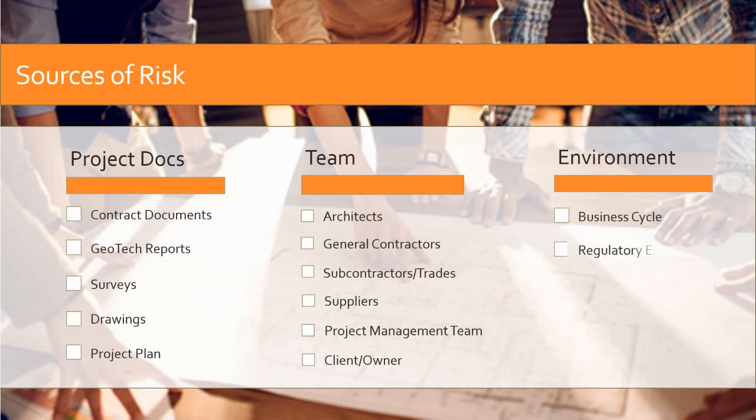What type of regulatory environment are we in? Is there a government change in the offing, or are these regulations likely to change soon? Also consider site conditions, the conditions themselves around the site, the weather. Where are we in the seasonal cycle, and is this likely to change with a modified start date?